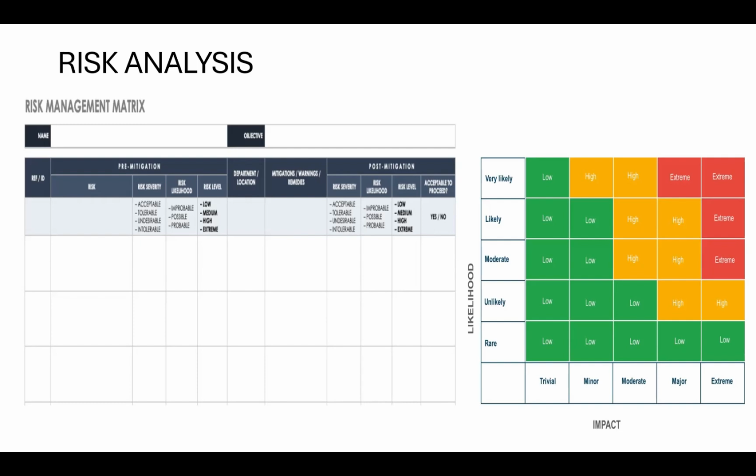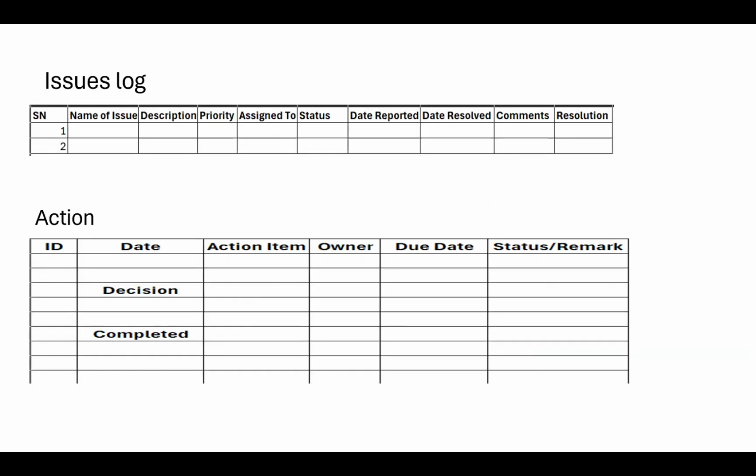So you will first of all identify the risk, you analyze the risk. After analyzing the risks, you look at the severity of the risks, the impact of that risk. Is it a high risk? Is it a low risk? How severe is it? Then you now bring your mitigation plan. That is risk management. Now, apart from risk, we take the next one.